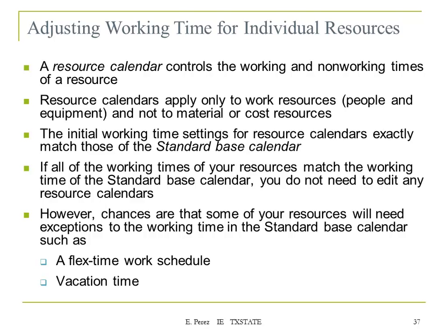If all the working times of your resources match the working time of the standard-based calendar, you don't need to edit any resource calendar. However, chances are that some of your resources will need exceptions to working time in the standard-based calendar, such as flexible time or flex time for schedule, some vacation time, or if the resource becomes sick, then you can put that into your calendar so you know that that person is not going to be available.